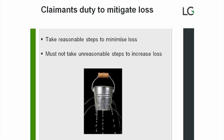The last point to touch on is the obligation to mitigate, which falls on the claimant and is likely to be a limiting factor on the extent of damages claimed. As a general rule, the claimant cannot recover damages for any part of their loss which they could have avoided by taking reasonable steps. There are effectively two steps: first, a positive obligation to take reasonable steps to minimise loss; and second, a negative obligation not to take any unreasonable steps to increase the loss. That concludes the overview of loss and damages in contract law.